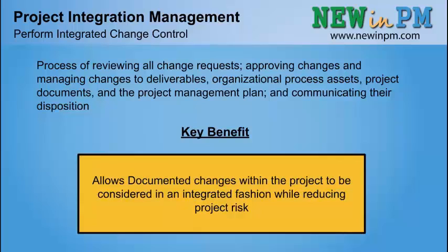Although changes can be initiated verbally, the best practice that applies here is that a change should be recorded in written form and entered appropriately in the change management system. Every change has to be approved or rejected by the project manager or the project sponsor.